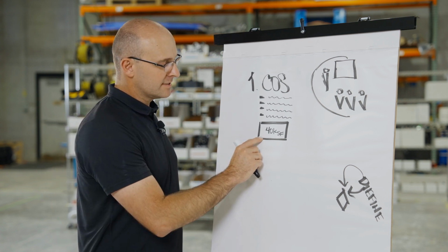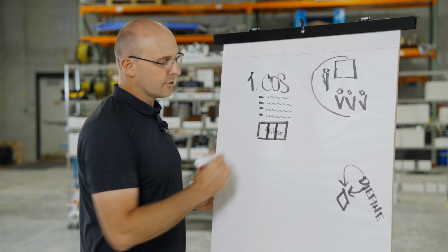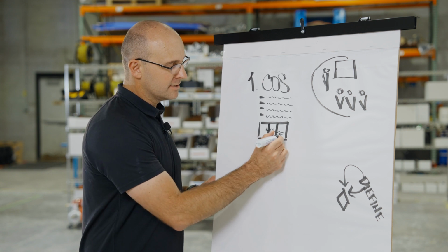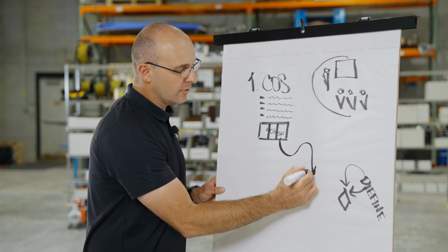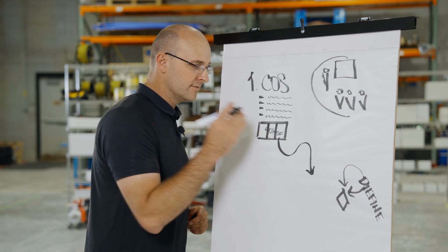So let's say, for instance, instead of one zone here, at a minimum you would want 3, possibly even 4, 5, or 6. But the bottom line is you're not going to pull plan the whole floor. Whatever you come up with here will be for one representative zone.